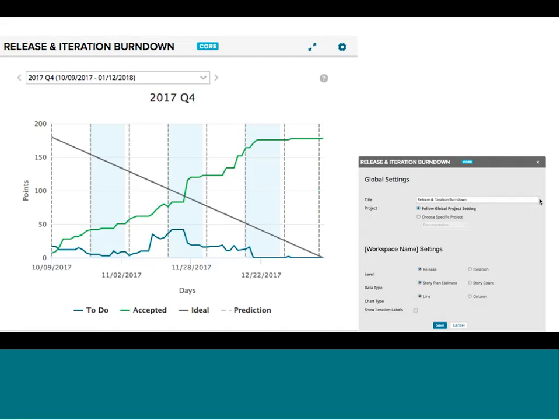So again, like scope creep in an iteration, kind of bad practice. When you're working in these releases or these PIs, it's just sort of the price of doing business. So it's important to know when you're experiencing creep, maybe why you're experiencing creep, and to address that, right? Like, is this something that we need to work with business on to eliminate in the future? Or is this something that's becoming a problem, or can we handle the creep? Are we able to sort of prioritize and reprioritize as we get these injections of maybe additional features or stories?